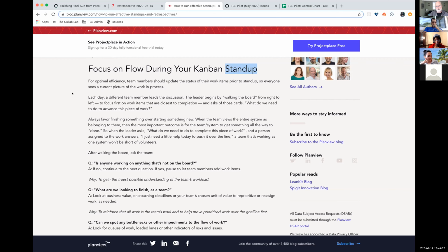As big as a team can get in Scrum, the stand-up should never last more than 10 or 15 minutes. It's supposed to be really fast, just quickly share status. Then people go off and solve problems outside of the Scrum, you don't do it there. In Kanban, well, actually in remote orgs, sometimes they'll do daily stand-ups. Sometimes they'll do asynchronous stand-ups.